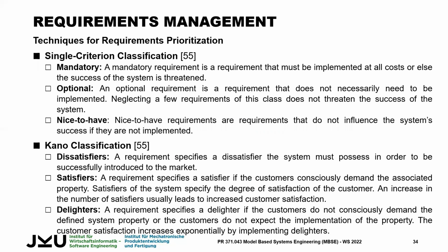Okay, there are some other techniques. One is called single criterion classification. This is pretty much the same as MoSCoW: mandatory, optional, and nice to have. Based on these categories, and of course, it is not about how you are feeling. The stakeholders and the other engineers have to agree upon this.